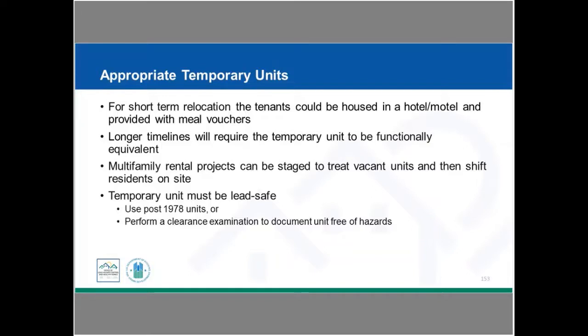Many times we're going to be working in a multi-family, multi-unit structure where we may be able to do what we call checkerboarding, where we treat some of the vacant units and then move people out of their units into a treated unit. And once their unit has been completed, maybe move them back. Or maybe we're going to leave them in that treated unit, complete their unit, and then move another household. So we would have a plan for moving folks and keeping them safe.